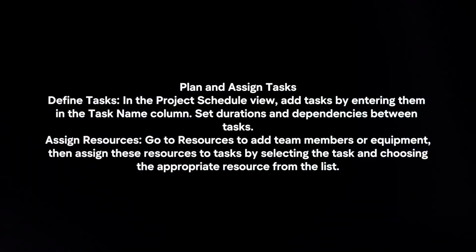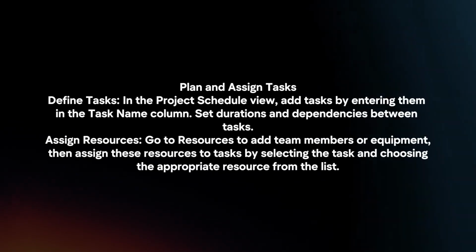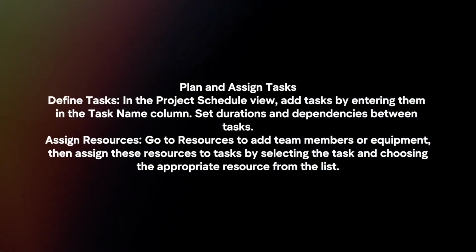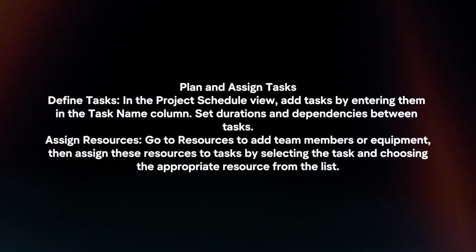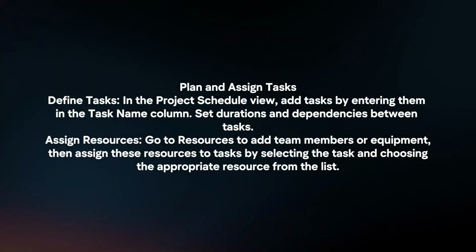Assign resources. Go to resources to add team members or equipment. Then assign these resources to tasks by selecting the task and choosing the appropriate resource from the list.